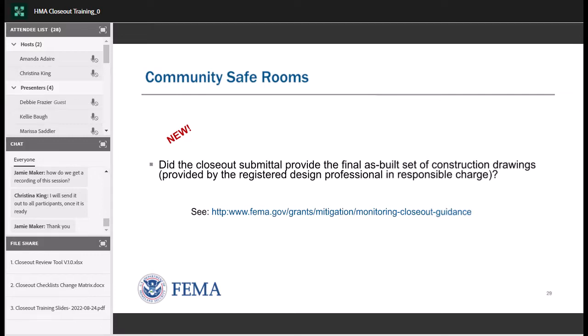The next requirement: did the closeout submittal provide the final as-built set of construction drawings provided by the registered design professional in responsible charge? At closeout we'll check that the engineer, architect, or registered design professional provided drawings of the community safe room with all dimensions and details. These as-built drawings must be signed and dated by the registered professional. Later in the presentation you will see a sample of what as-built drawings should look like.